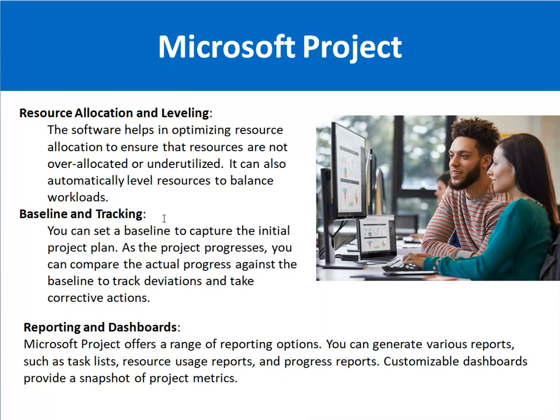Once you click on the baseline option, the tracking would start. If the first module should be completed in the month of November, for example, and it is not completed, it will tell you that there is a deviation from the plan, and you can take the corrective action. So baseline is basically to track the progress in terms of timeline and in terms of cost as well.